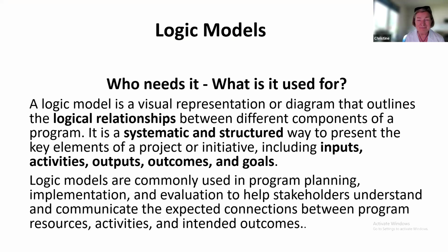A logic model is basically a typically one-page representation that outlines the logical relationships between the different components of your project. It's a systematic and structured way to present all the key elements of your proposed project, including what goes into it, the inputs, what you will do, the activities, what will be the results, the outputs, and what may happen after the project is finished, the outcomes, and how they relate to your stated goals.